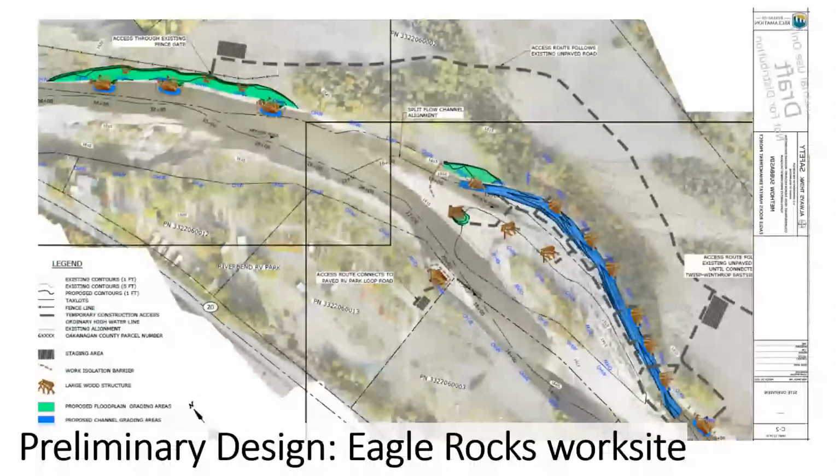So what we've got here is the draft 30% design. We'll be finalizing 30% based off of viewer feedback over the coming weeks. At the upper side, we're going to have some bank marginality features. As we finalize 30%, we're going to look at decreasing the size of structures, but increasing the quantity of them. Our hope is this will provide covered water area and also help reduce some of the costs.